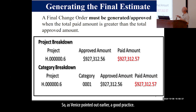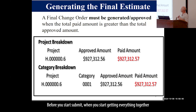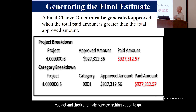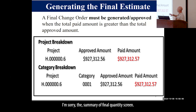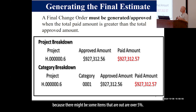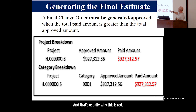A good practice before you submit your paperwork is to check the Summary of Final Quantities screen. It'll tell you if you need to do another final change order because there might be some items that are out or over 5%, and that's usually why this is red.